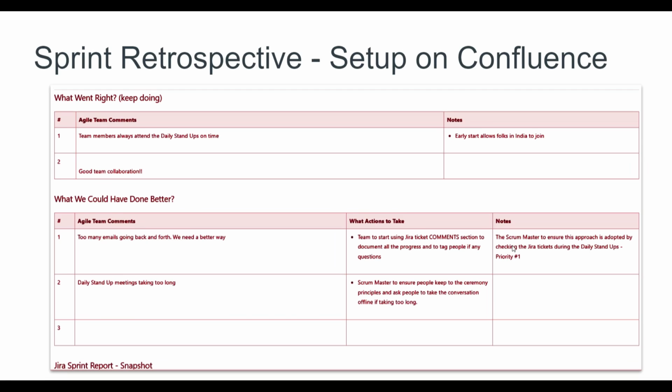And for the following retrospective, the team would come back and would actually look at that and say, was there any progress made to the last issues or the points they have raised? Have they been addressed or not? And if they haven't, they just continue to be flowed into the following retrospective action items until they actually deal with that. This way, the team knows that if there is anything that needs to be improved, it is taken care of and it is actually completed.